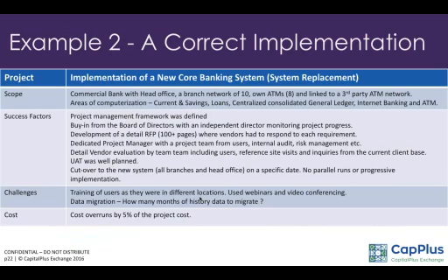The RFP was 100 pages, where the vendor had to respond to each requirement. For each line of the requirement, the vendor had to say whether it's in his standard product or whether he has to modify it. If it has to be modified, what's the percentage of the modification? Or if it's a new requirement, how long it takes, or if that vendor can't provide that requirement. So it went into details.